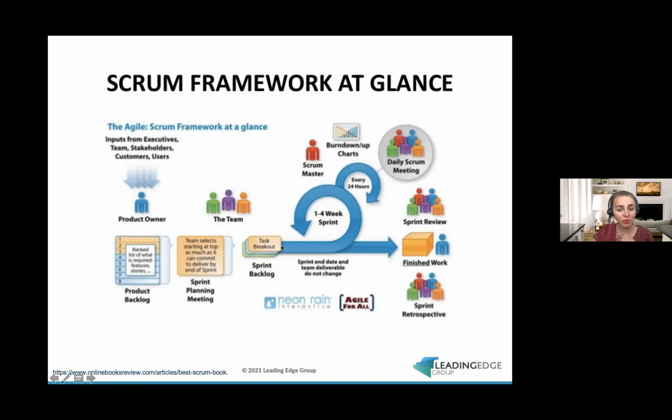And then the sprint starts, and every day of the sprint, the team would meet for 15 minutes. That meeting is called the Daily Scrum. It is also called informally a short-term planning or alignment meeting. It's about the team aligning for the next 24 hours on how they are going to execute the work to achieve the sprint goal, the goal that they set for themselves for that sprint. This meeting has been so popular and proven so effective that many companies, even those who do not do Scrum, adopt those 15-minute morning catch-ups just to align the team.